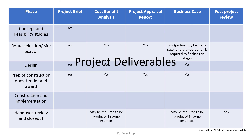As we can see on screen, we have some key phases from an example client. This has been adapted from the NRA project appraisal guidelines, and this specific client requires a project brief, cost analysis, project appraisal report, business case, and post-project review — required at different stages throughout the project timeline. This table may look different depending on your client and their needs, but it's really important in that first kick-off meeting or when signing the contract that you are very clear on what deliverables the client foresees as being required.